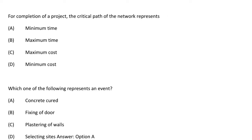The first question: for completion of a project, the critical path of the network represents — option A minimum time, option B maximum time, option C maximum cost, option D minimum cost. The correct answer is option B, maximum time.